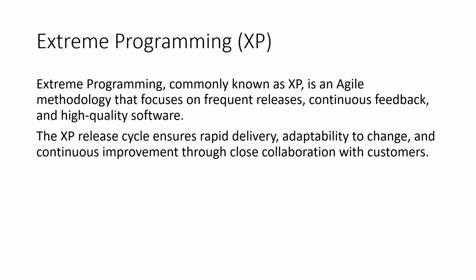Extreme programming or XP follows a short and frequent release cycle focused on continuous feedback. The process begins with release planning, where customer requirements are captured as user stories. These stories are divided into short iterations lasting 1 to 2 weeks.